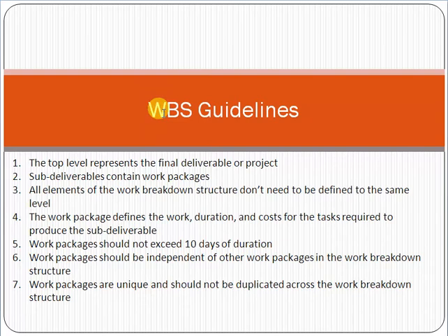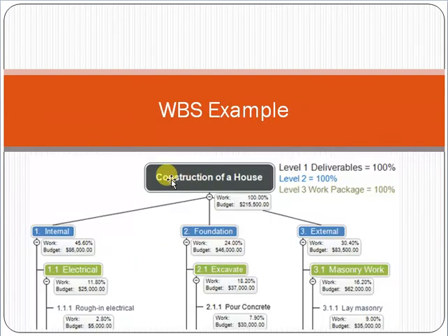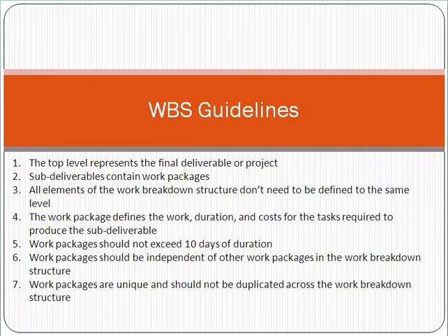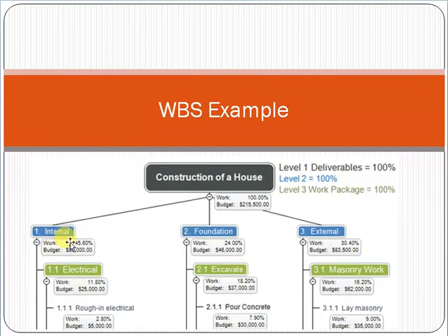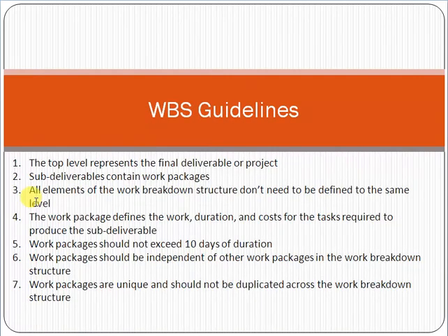Friend, WBS guidelines are very simple. First of all, remember that the top level represents the final deliverable or project. This is the top level. Then the sub-deliverables are called the work packages. These are called work packages, for which I can estimate the time, cost and effort required.